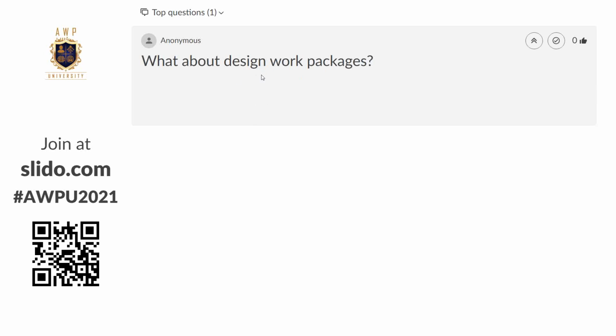When we talk about design work packages, as far as in engineering, as to what designer is doing what grouping of work goes to an individual for engineering development, those would typically be rolled up and tied to the EWP deliverable, which is then obviously mated to its one or many CWPs and the web of influence to that CWP. Design work packages are not typically construction forward facing.